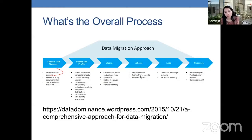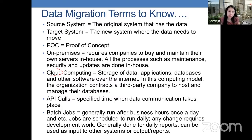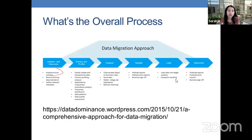The validate phase is where we do preload reports, preload error reports, and business sign-off — this is where proof of concept comes in. We want to move small pieces or merge small pieces of data to make sure we're headed in the right direction. We don't want to take a whole system and without any testing move it over, because that could be a recipe for disaster. The load phase is where we load the data to the target system, paying attention to exception handling — where data either is not mapped over appropriately or we're seeing errors and defects.